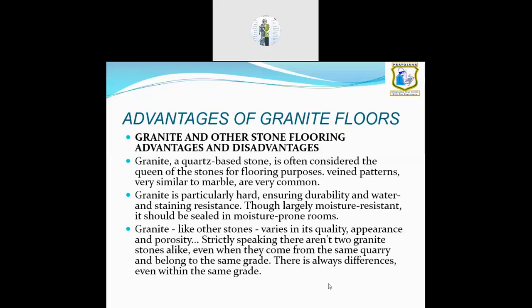They come from the same quarry. That's why the grade of granite should be selected from one lot. In each quarry, discoloration will happen, and in the next layer you will not get the same batch and the same grains will not be available. That's why, like tile selection, even granite selection is very important. You select from a single lot and cut the entire surface together.